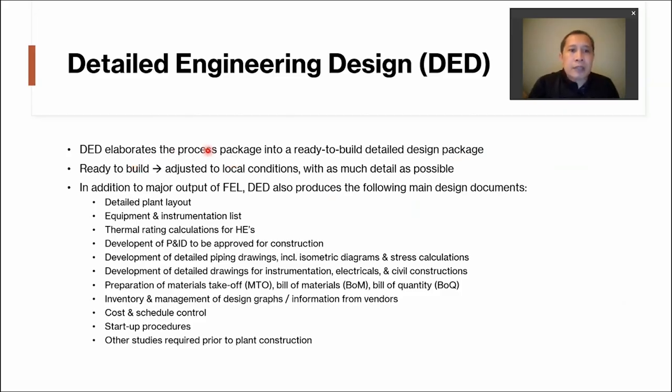Essentially, DED elaborates the process package. Remember, process package does not yet contain any location-specific or condition-specific design information. It has to be adapted to the project location, to the project circumstances, into a ready-to-build detailed design package. Okay, ready-to-build means it has already been adjusted to local conditions with as much detail as possible.